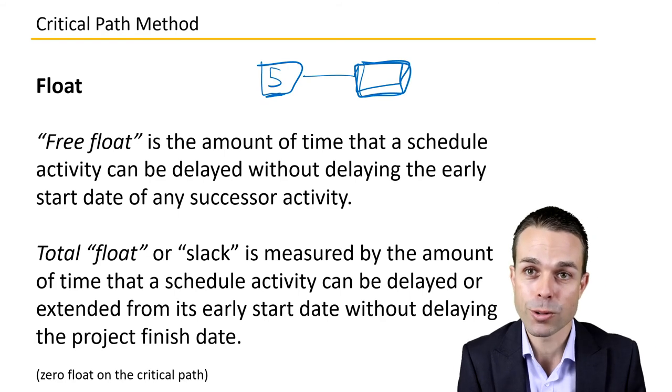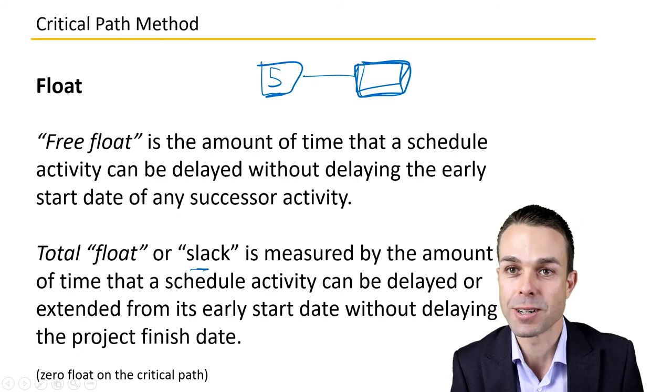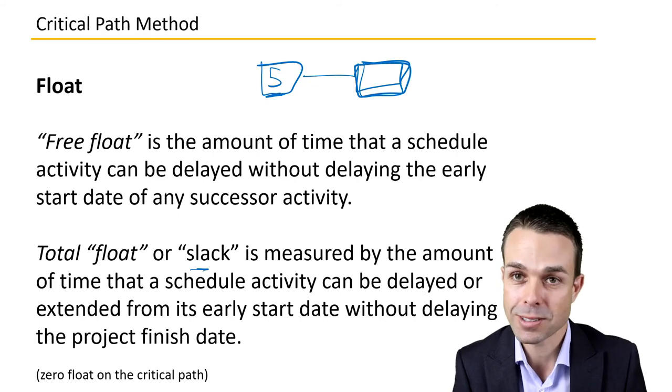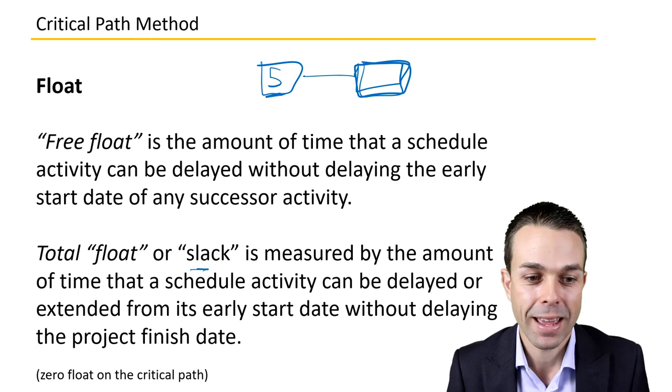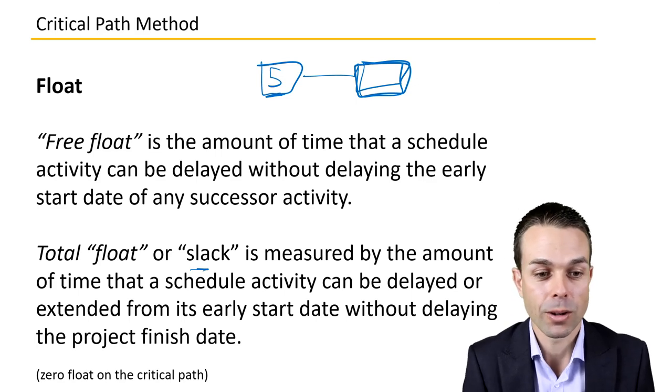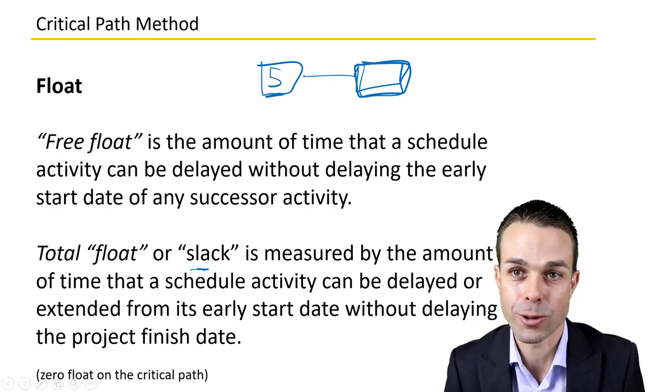Now, total float or project slack is measured by the amount of time that a schedule activity can be delayed or extended without delaying the project finish date. And so zero float, as we said, is shown on the critical path. So there's no leeway on that critical path.